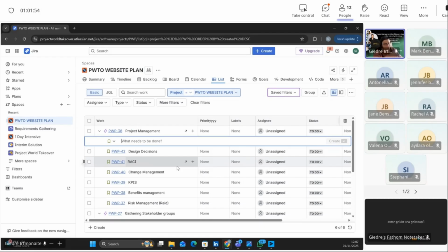But when we're working on projects that are massive, people will end up saying to you, well, who made the decision? And you'll be like, oh, it was said in this meeting. They're like, but who? Have you got evidence of it? We basically need to track the decisions so that if something comes up like, how did you get to this decision, you can go and showcase it. So we will actually create a decision log as well, but this one will be easy. It's just so you understand.